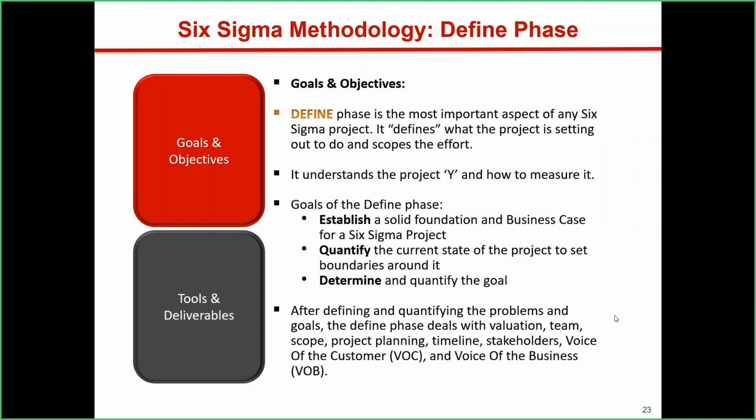So what has to be defined well is what comes in your boundaries. What is a business case? So at the end of the project, we'd like to save 5,000 naira per month on electricity. What is the current state? Currently, we are spending, say, 15,000 naira, and we are only going to cover any and every appliance which is powered by electricity.